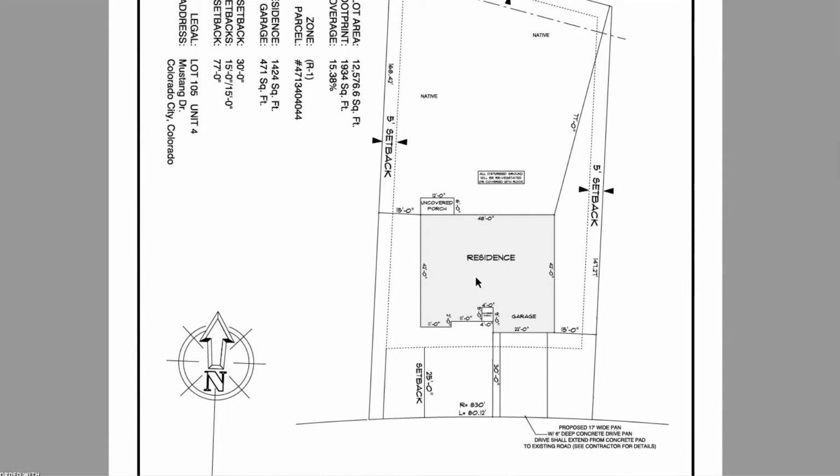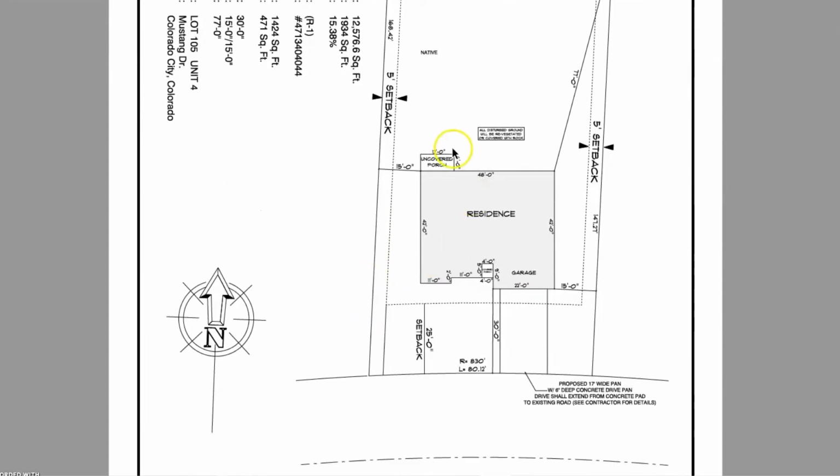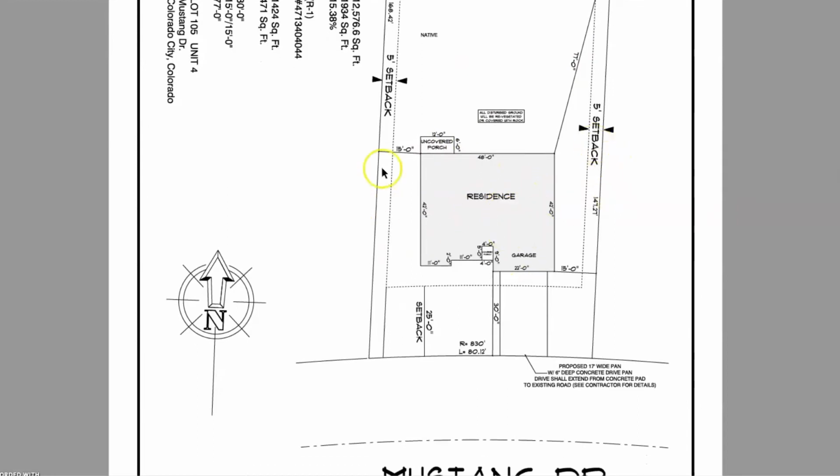So this is very important to look into and understand ahead of time, right, before buying your lot, and why I also say you need to have an idea of the plans. You don't necessarily have to have them nailed down exactly, but you need to know the approximate width and length of your structure and make sure that it's going to fit on the lot you're buying, given the setbacks. So very, very important here, because again, this is something I've seen people go wrong with many times. The structure has to fit on the land, given not just the actual size of the lots, but the setbacks.